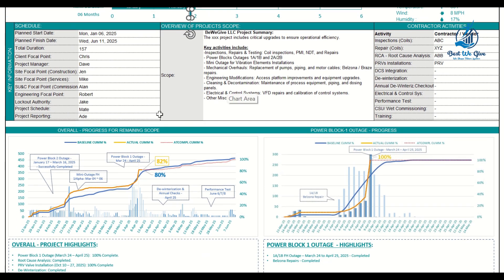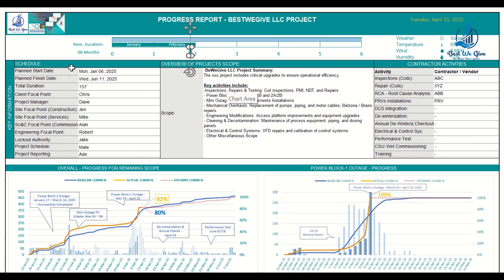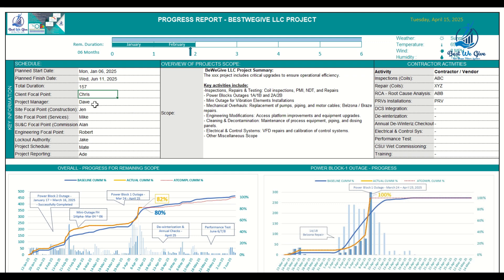Coming down to the next section, which covers schedule and important dates: your start date comes from when your project started, your planned finish date comes from the last date in your schedule, and it automatically calculates the total duration. You also put in your focal points — for example, I've put random names here: Chris for focal point project manager, Dave for site focal point, Jen for services, Mike for startup and commissioning, Alan for engineering, Robert for lockout, Jake for schedule, and Eddie for project reporting.